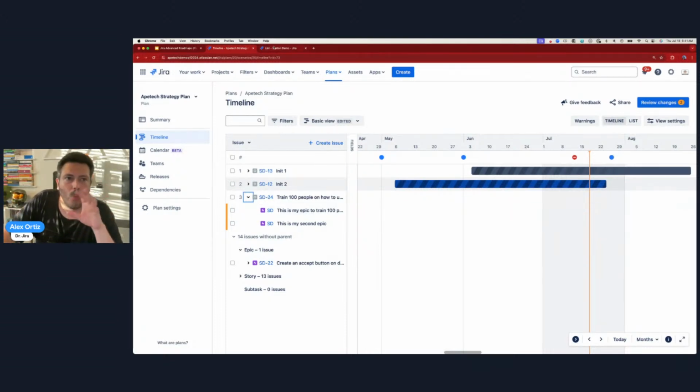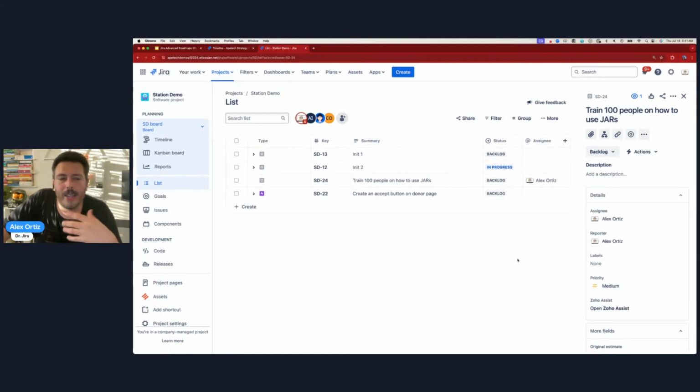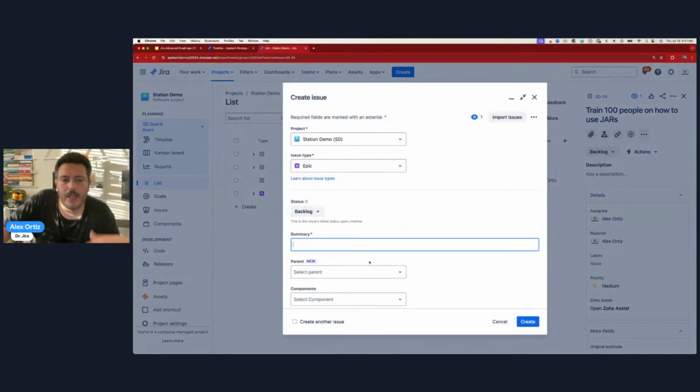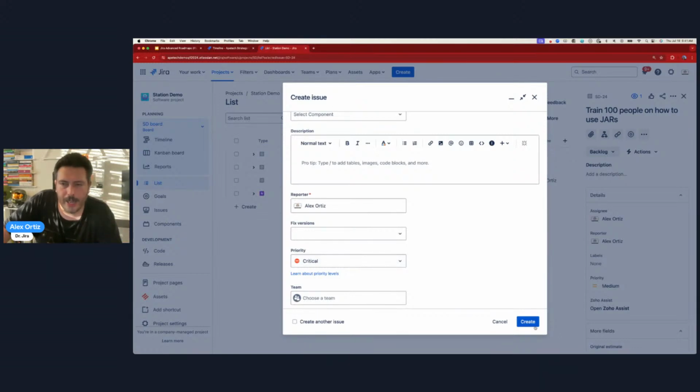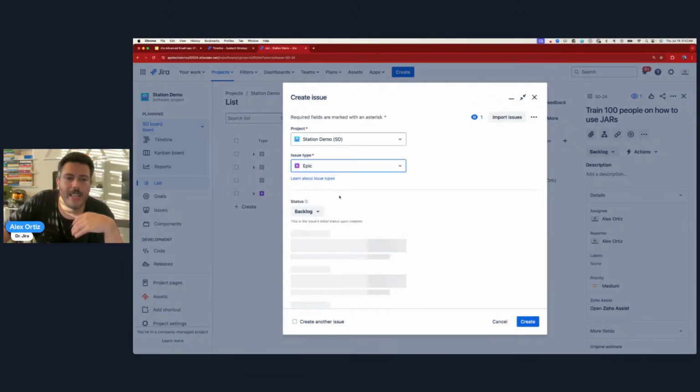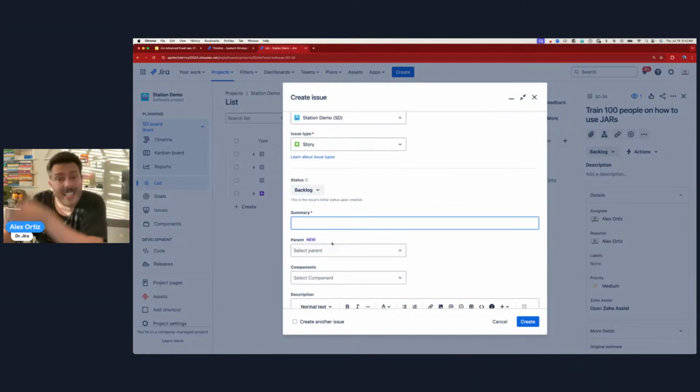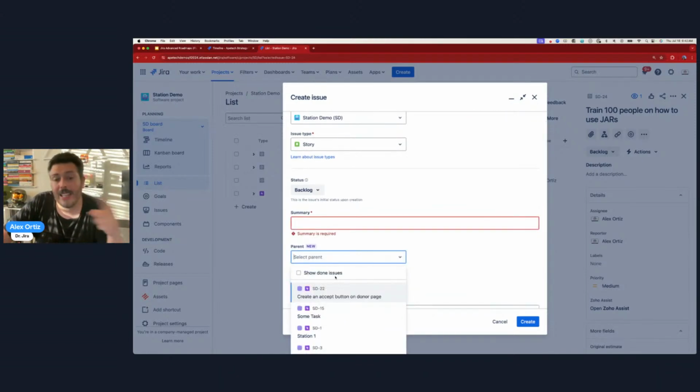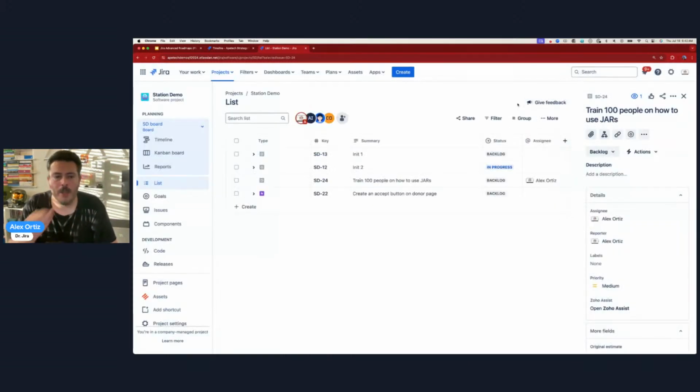When you are in Jira and you want to create an epic, you can come in here, hit create an epic, give it a title, fill out all the fields, hit create, right? Then you're creating your next epic. You're doing the same thing. Then you're going to go create your story, so you change it to a story. And then in here, when you give it a title, you got to link it back to your epic. So you got to remember the parent. And there's just a lot of activities happening here. You got to remember a lot of stuff when you're using the create button in Jira. Okay, not so pleasant. Disrupts your flow, in my opinion.